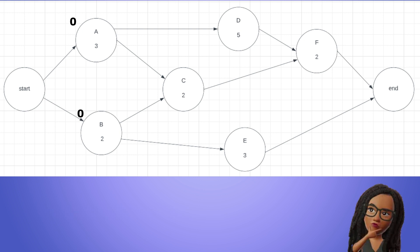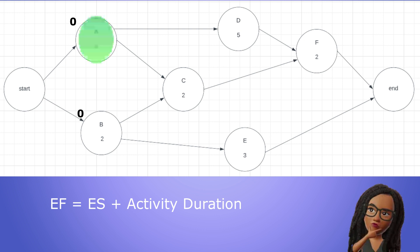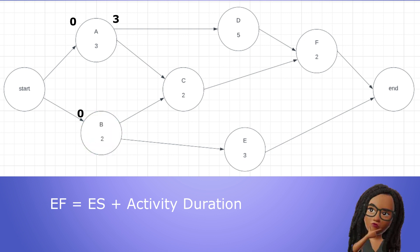Good. Now let's calculate their early finish using our formula: EF equals ES plus duration. A has a duration of 3, so its early finish is 0 plus 3 equals 3. B has a duration of 2, so its early finish is 0 plus 2 equals 2.